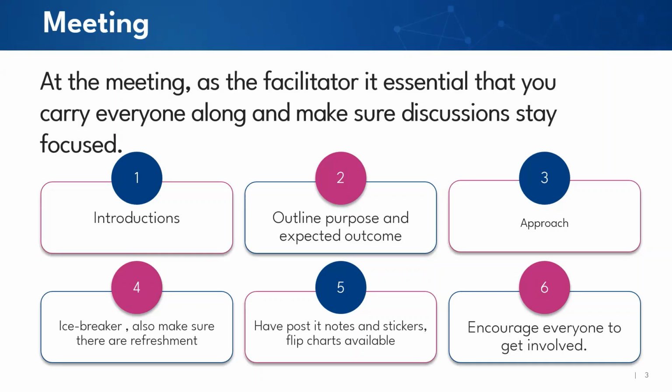You will quickly see that as the workshop goes along, there will be a general theme of activities, and then a general theme of lessons. You let everyone write their notes, and then you tell them to go and put them in the section of the wall that is most relevant to what they have written down. Everyone puts it up, and then you go around the room and group things that are in the same category, because you're almost sure some people will write the same thing in a different way, but they're talking about the same risk, the same lesson, or the same deliverable. Then you start grouping them into groups that make sense, right?